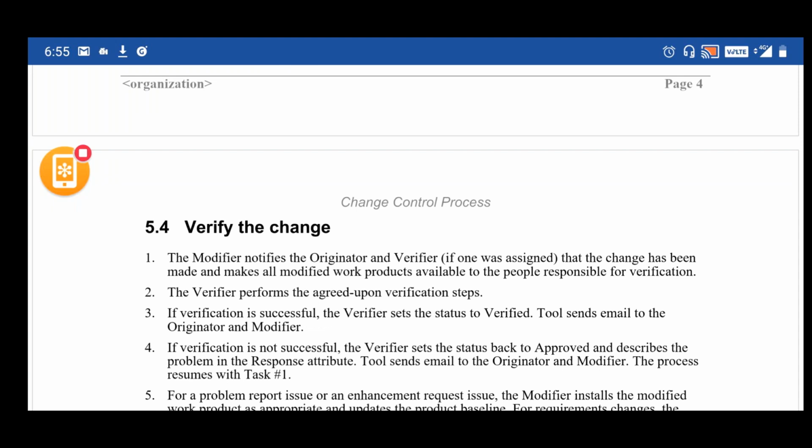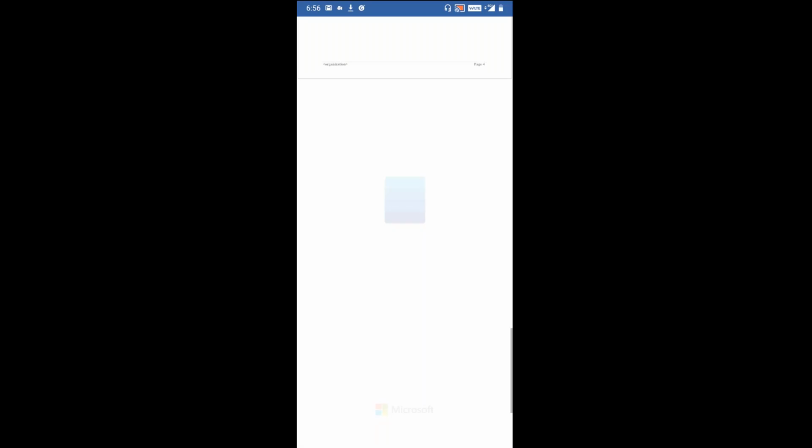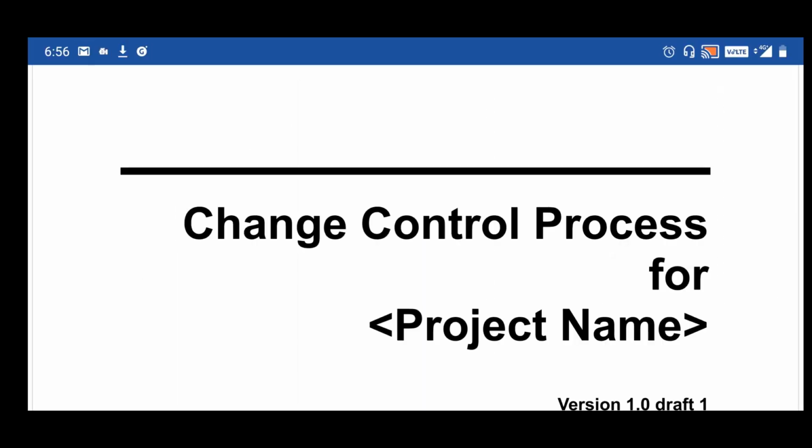If there is a major set of features that needs to be implemented, we will consider that a project rather than a change request. A change request has a much quicker approval process and has less impact on the system. While if you do a project or enhancement to an existing system, it will obviously take time to document things in a formal manner, get the approvals and all, which takes time and obviously has a duration also. It's not that you give a project and I'll quickly deliver it. You'll get some time to deliver those enhancements.